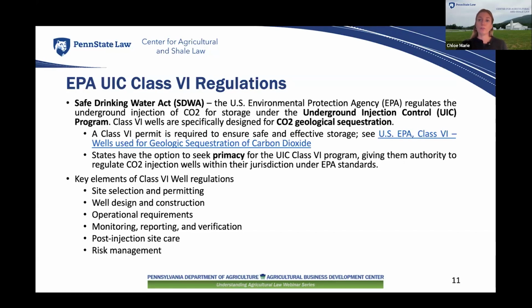Operators must also prove that they have the financial resources to cover corrective actions, well plugging, post-injection care, and emergency responses. They are required to have a site-specific emergency response plan and must report all testing and monitoring results to the EPA to ensure compliance with regulations.